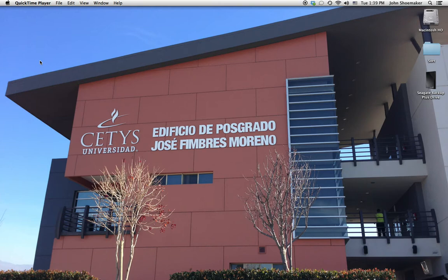So, for example, we could brainstorm the technical quality or performance risks. And when we complete that, we can talk about, well, what are the project management risks, or organizational risks, or external risks? It really doesn't matter how you do it as long as you come up with a good set of risks at the end of the process.